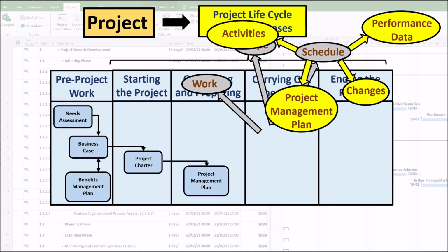Components that may require a change request for the project management plan include but are not limited to: 1. Schedule management plan. The schedule management plan may be updated to reflect a change in the way the schedule is managed. 2. Schedule baseline. Changes to the schedule baseline are incorporated in response to approved change requests related to change in project scope, resources, or activity duration estimates.